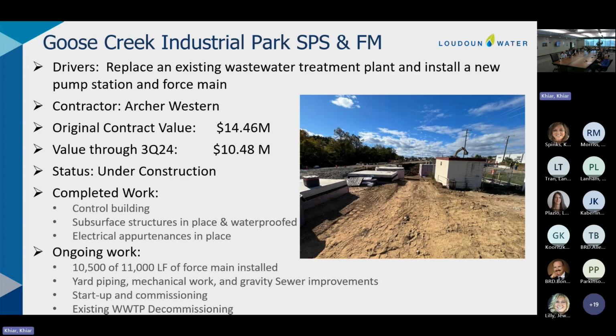As I mentioned earlier, startup and commissioning, and then one important component of this, towards the end of the project, we will decommission the original wastewater treatment plant that was on the site upon which this project is being built and currently still in operation. So that's a lagoon system that we will drain, restore, backfill, and have in place, perhaps in the interim, to support Milestone efforts, which are pretty much adjacent to this property.